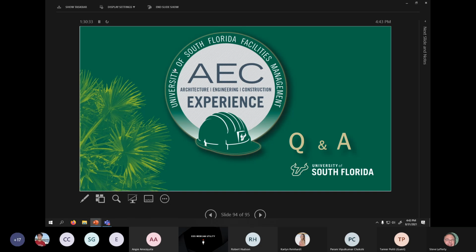Yes. Beyond design, our construction partners are part of it, and we actually record all of the recycling and split it out. Concrete is in one. When our furniture arrives, we have to break down the boxes and recycle those in a certain area. So it's not just design, but it's actually how we build it as well. An example of that, when we renovated the Sundome or the Yingling Center, we recycled about 85% of what was taken out of that building, whether it was the chairs, the concrete, or everything, rather than sending it to a landfill.